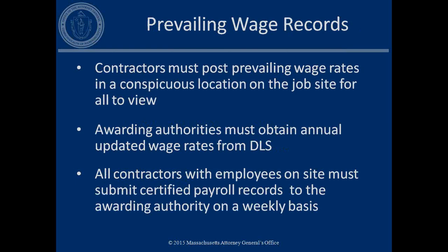It's done by project. I've also just noted the issue of apprenticeship. I'll mention briefly that if a contractor is listing apprentices on their certified payroll records, they must have a registered apprentice program with the Department of Labor Standards, Division of, I think it's the Division of Apprenticeship Services. But it's important to just ask the question if you're part of project management or overseeing a project where you see apprentices listed. It's as simple as just asking the question: do you have a registered apprentice program with the state? If you're not comfortable with the answer, you can call the Attorney General's office and we'll ask the same question. If the apprentice program is not registered, then those workers are due the full journey person's rate for the time worked on the project.